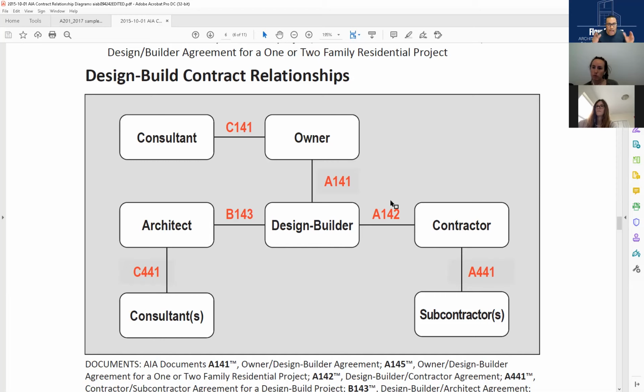But today, after I had a cold head and I went to the site and I saw Pedro working on that flooring, I looked at it and I said, wait a minute, I shouldn't be absorbing the cost of this. The bouncy floor was the consequence of a change order that wasn't approved, neither was it requested. So because I failed to provide notice that the floor was going to be bouncy and I proceeded with that work, I am at fault in the replacement of that floor and reinstallation of that floor, including also the reinstallation of all the wall base around because we got to take the whole floor out and the wall base also.